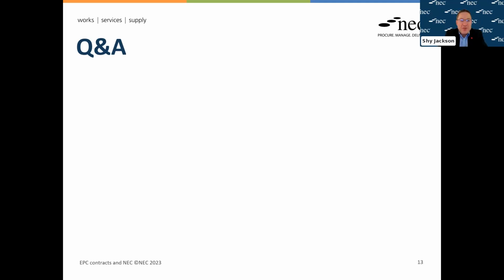It's an interesting question. Generally, people are expected to comply with the performance requirements. And the fact that perhaps it is just a few percentage points off what is required, I think it will be difficult to argue that that should be regarded as having achieved the acceptance tests. In practice, it tends to be a technical question because the follow-on question can sometimes be, what are the consequences of failing to achieve it? And if the client can demonstrate that while it might seem a very small difference, it has serious consequences, that makes a difference. And if it does not have real consequences, then you might try to argue about reasonableness. You might try to rely on the obligation to act in a spirit of mutual trust and cooperation. But I think it is better and safer to assume that if a certain performance criterion is specified, then that's the one that needs to be achieved.